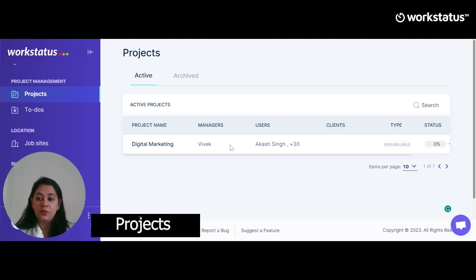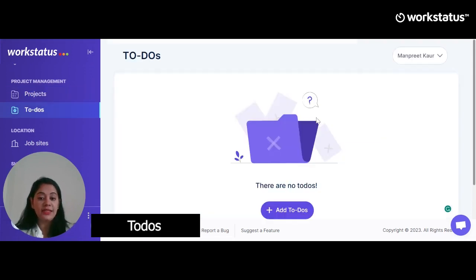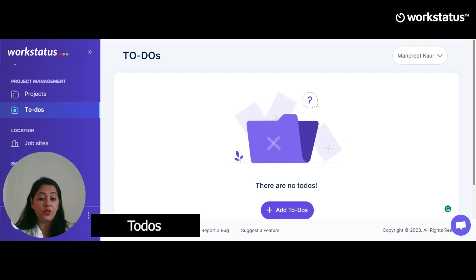Now let's move on to To-Dos. Projects need to-do tasks, so next we have To-Dos. To add a to-do, you can mention the name, project members, start and end date, description, and attachment if any. Press the Save button and your to-dos are ready. Please note, regarding file size, you can add documents in to-dos up to 5 MB.